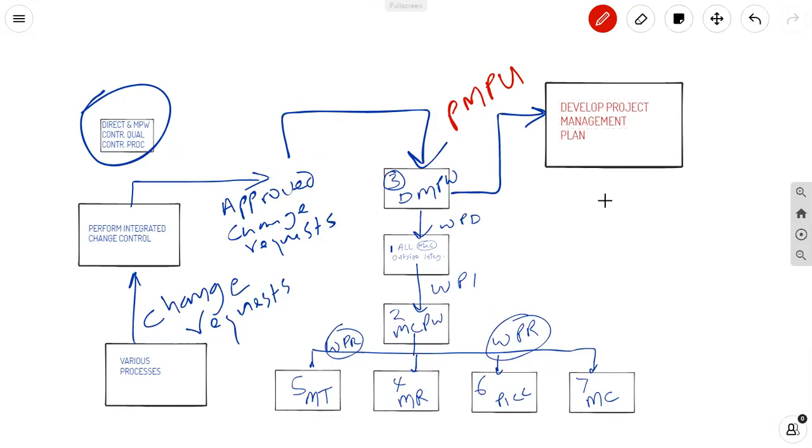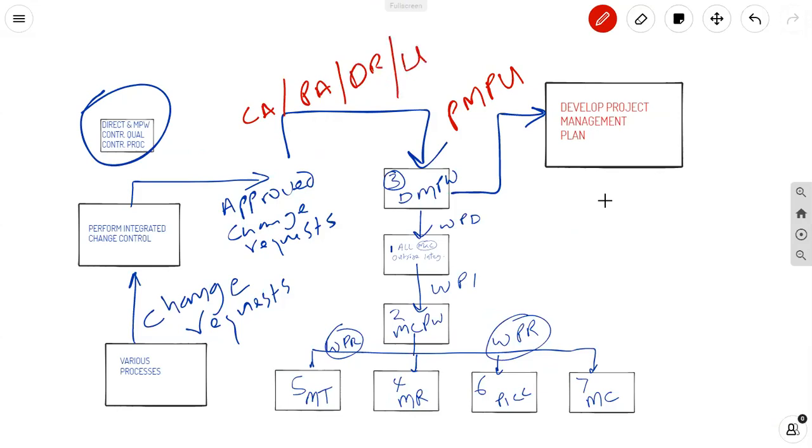Remember, these approved change requests are corrective action, preventive action, defect repair, and updates. Also known as CAPADRU. You've got to remember CAPADRU is really what these approved change requests are based on.